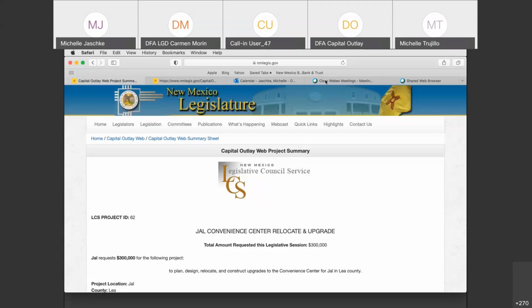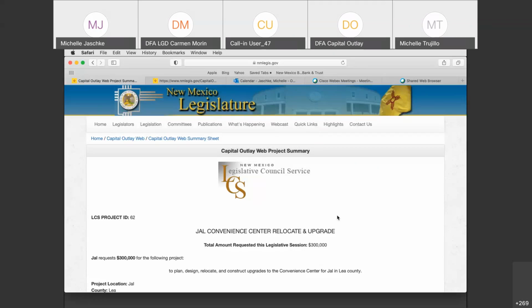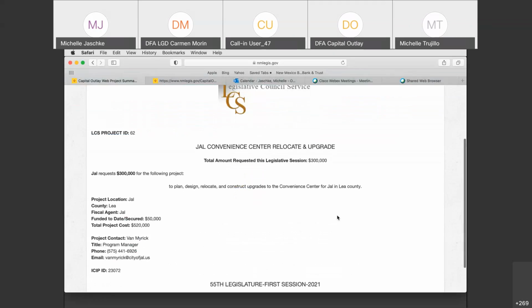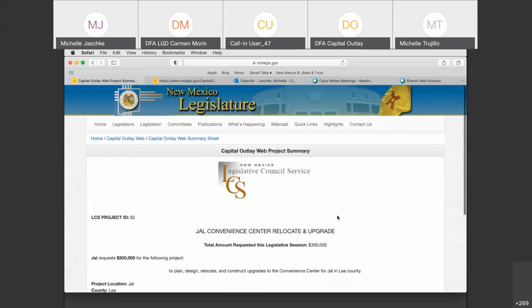And then the most important, you are required on a monthly basis at the end of the month to update CPMS. Also, just to let you know, part of the checklist that we have with DFA is to make sure that when a pay request or a reimbursement request is submitted, you have updated your CPMS, and that's something that I actually have to include as part of my backup when I submit it to management.